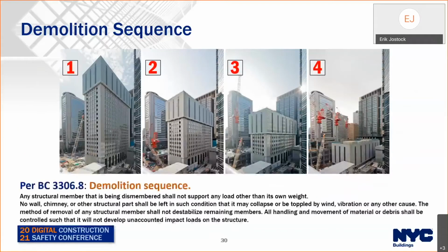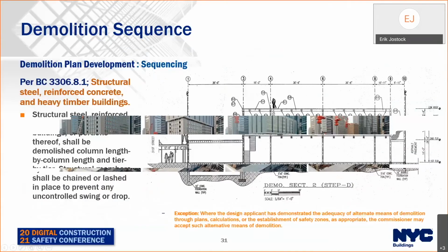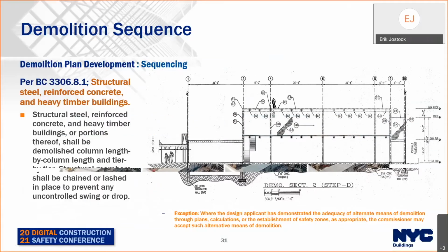Demolition sequence is a top-down procedure. This example is something we don't see here, where instead of from the top down, this is the bottom up, but the slide is to illustrate the order that things have to happen in.